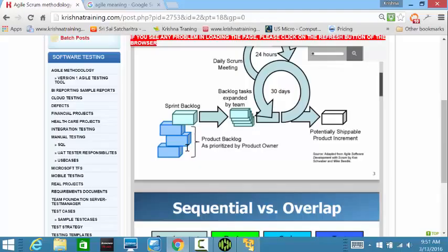Now from the main requirement, you have divided into another 12. That main epic has 12 requirements to be met. So that epic will have 12 requirements. They mention in that epic, these are the 12. Okay. Now under the 12, we have come up with another 24, right? 12 for one and 12 for the other. So each of the 24 would be called a user story. So user story 1 to user story 24. User story 1 to user story 12 is assigned to one team. User story 13 to user story 24 would be assigned to another team. Clear?